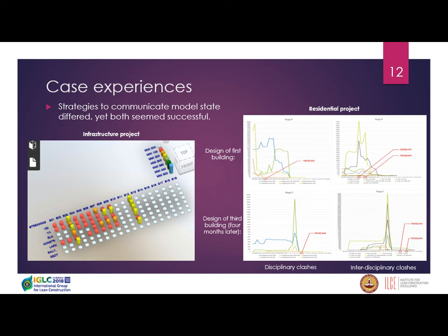In fact, it spikes up on the interdisciplinary side. But just 4 months later, during the design of the third building, we see exactly the pattern that we're looking for, with a significantly declining trend in the amount of clashes just in time for the models to mature. The two sections here obviously are comparable in terms of complexity and size.